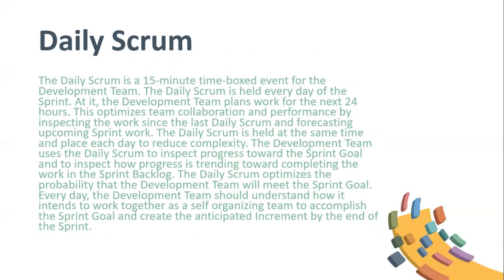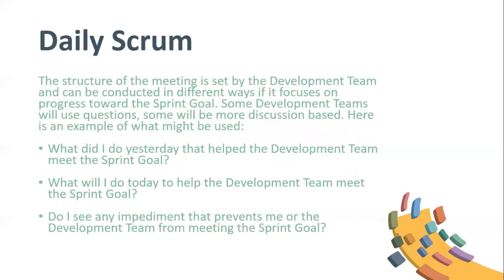Daily Scrum: the daily Scrum is a 15-minute time-boxed event for the development team, held every day of the sprint. At it, the development team plans work for the next 24 hours. This optimizes team collaboration and performance by inspecting the work since the last daily Scrum and forecasting upcoming sprint work. The daily Scrum is held at the same time and place each day to reduce complexity. The development team uses the daily Scrum to inspect progress towards the sprint goal and to inspect how progress is trending towards completing the work in the sprint backlog. The daily Scrum optimizes the probability that the development team will meet the sprint goal. Every day, the development team should understand how it intends to work together as a self-organizing team to accomplish the sprint goal and create the anticipated increment by the end of the sprint. And that concludes part three of the Scrum Guide.